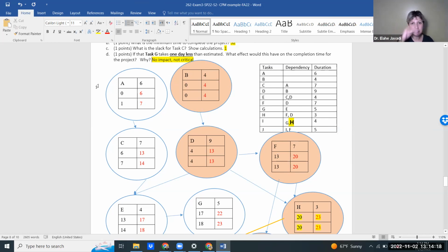Also, this is a dynamic thing. Sometimes you expedite a critical path, but the critical path changes. It goes on another route. So there is a limit to what you can do. You can make this go faster, but if it's not the critical path anymore, like after 10 days, the other path becomes critical, and so you have to work on the other path.